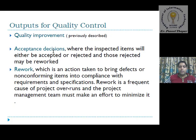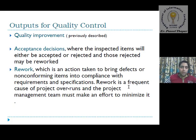The user can accept the product or the inspection item will be either accepted or rejected. Rejected items may be reworked. Rework means an action taken to bring defective or non-conforming items into compliance with requirements and specifications. Rework is frequently a cause of project overruns, and the project management team must take effort to minimize it. Reworking means re-engineering — reproducing the system using user feedback and requirement identification, then editing and redelivering.